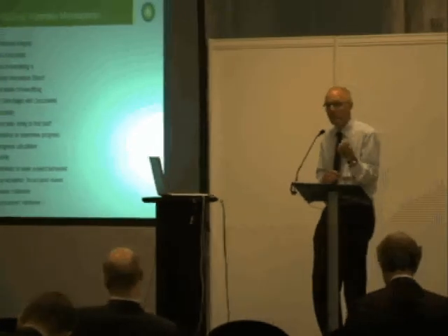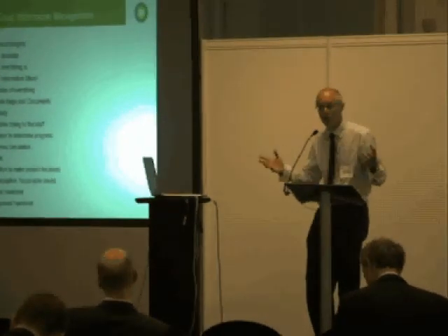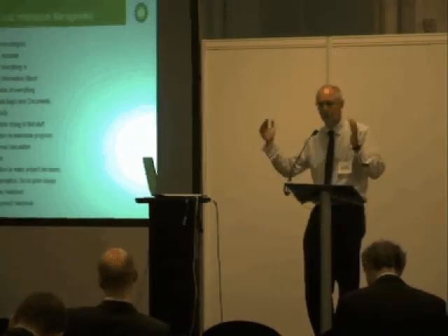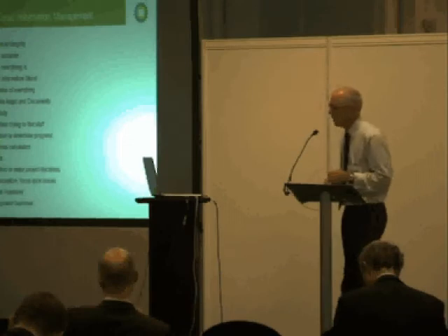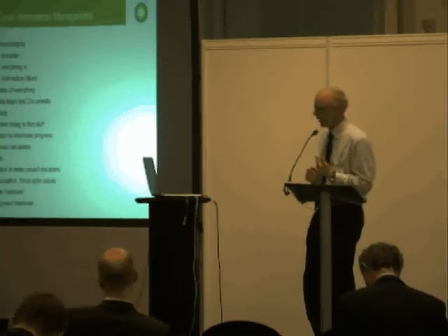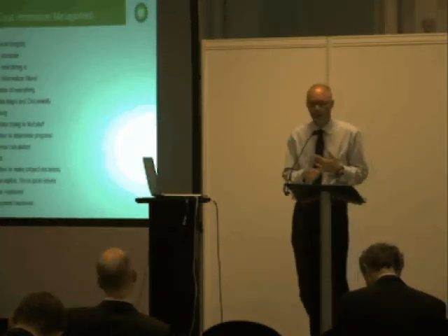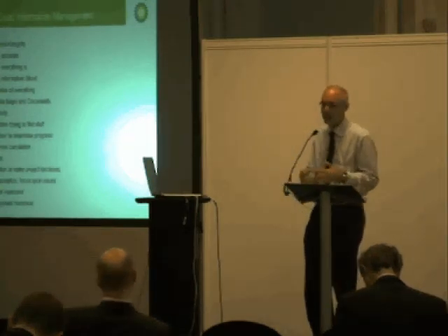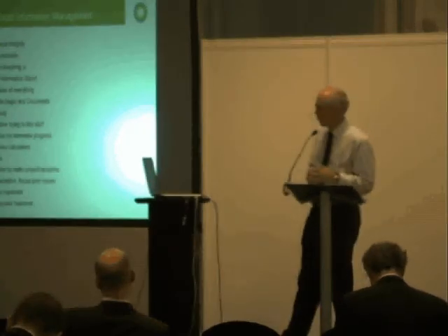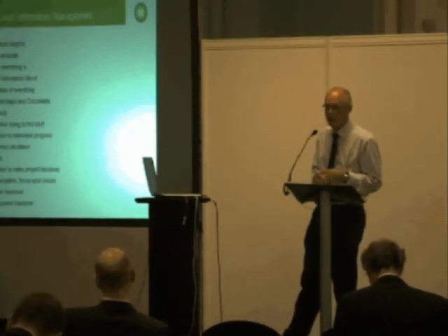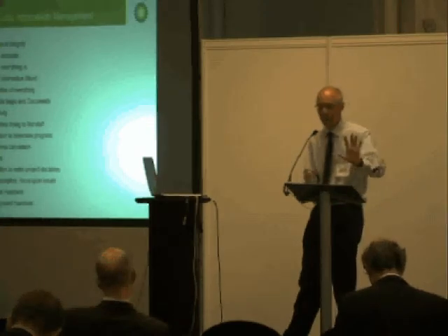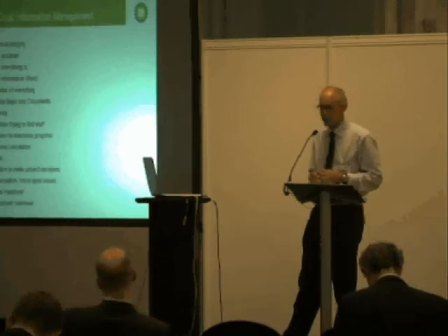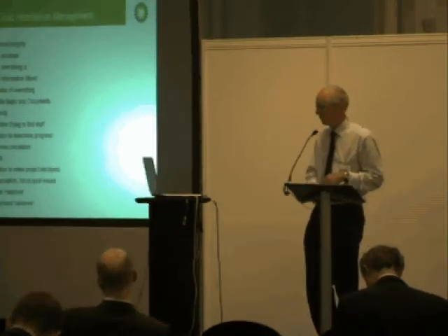We want to use this information to help us determine progress, overall progress. Progress the components, you progress the activity, you progress the overall project. And therefore we use this as a basis for KPIs. And we want to use this information to make project decisions. Things like, well, when do I decide to start manufacturing these 100 valves? And we use it to drive information handover. At the end of the project, you're handing the physical plant over incrementally as the things are commissioned. You're also handing the information over that's in support of that activity.